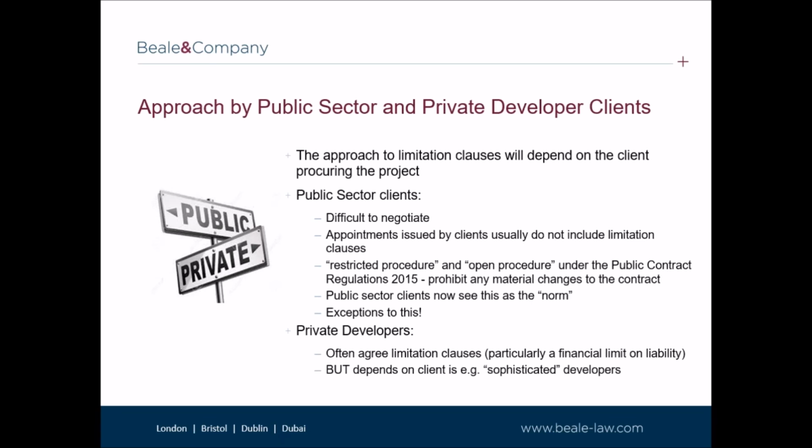These regulations prohibit any material changes to the contract. The regulations apply to tenders by contracting authorities which fall within specified financial thresholds. Where they apply, clients must use certain procurement procedures.